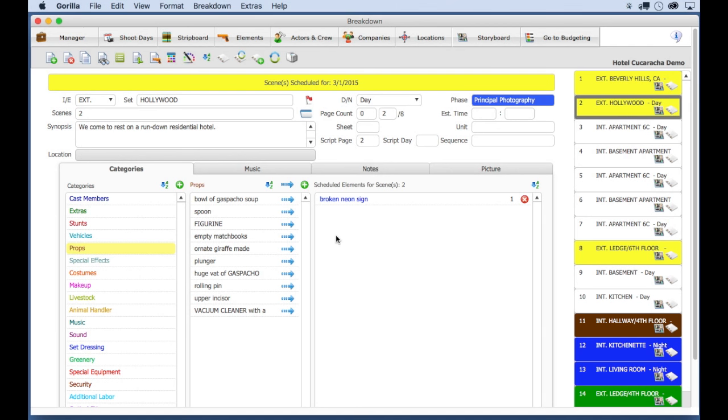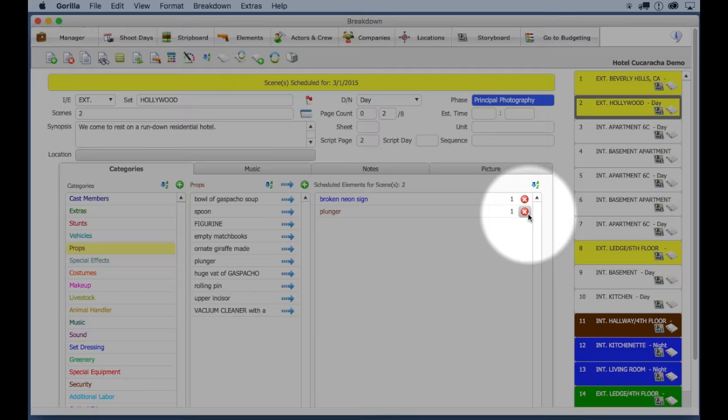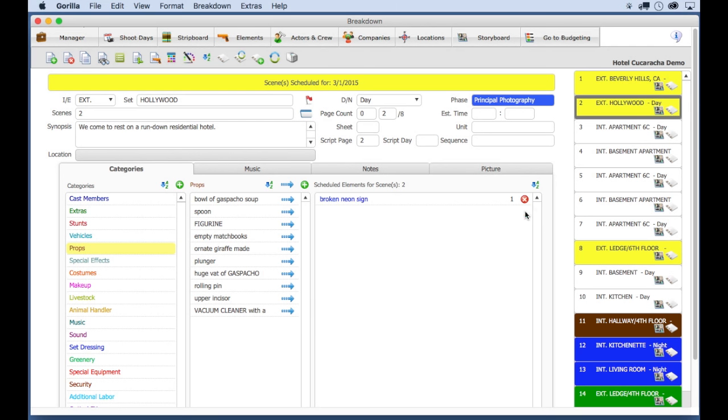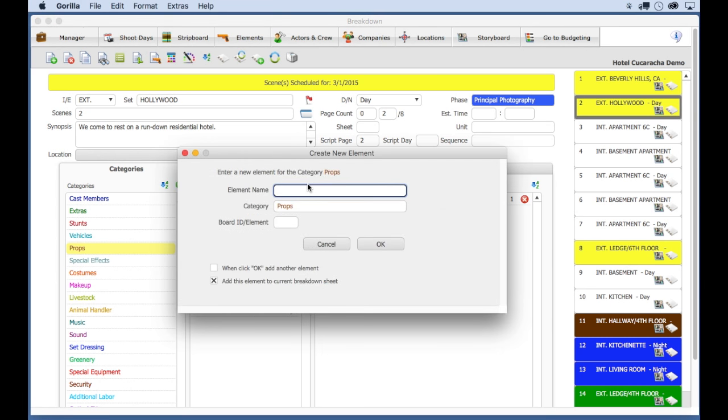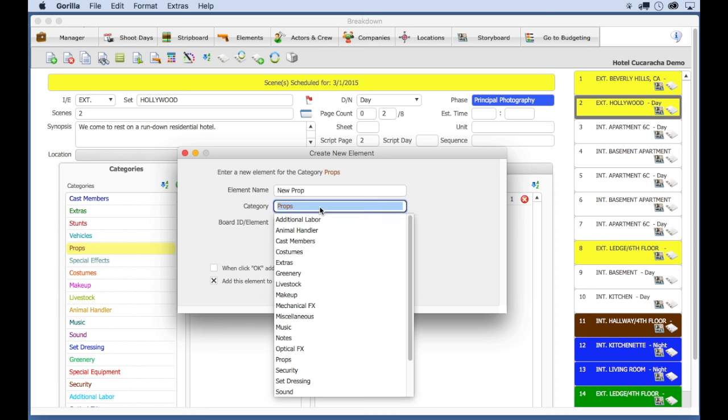To add an element to a scene, select that element in the middle column. To remove it, select the Remove Element button. To add an element that is not in the list, select the Add Element button. Here, you can also specify the category for that element.